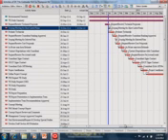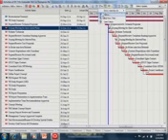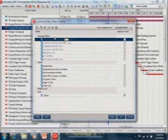One more thing helpful to us in this environment is, can you give us an example of a report for like a 2-week look ahead? What are the things I need to be watching out for over the next 2 weeks? Yeah, and so there's this standard filter in Primavera that's called activities occurring within 10 days. The default right here is 10 days, but we can set that to be, 10 days is 2 weeks in Primavera terms, right? So just by turning on this filter, it's going to show you all activities that are scheduled to work from the data date, whatever the current data date is, plus 2 weeks.